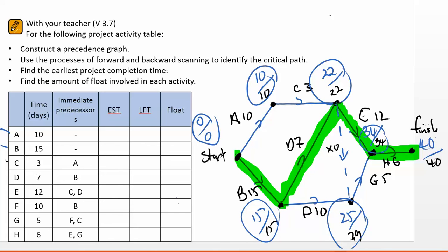Now what I'll be doing in a moment is just working through these on the chart. Please take some time to analyse this, it is a little fiddly. Working these through, I quite often find it's easiest to put in my critical path components. That way I can actually work out the float times much more readily.